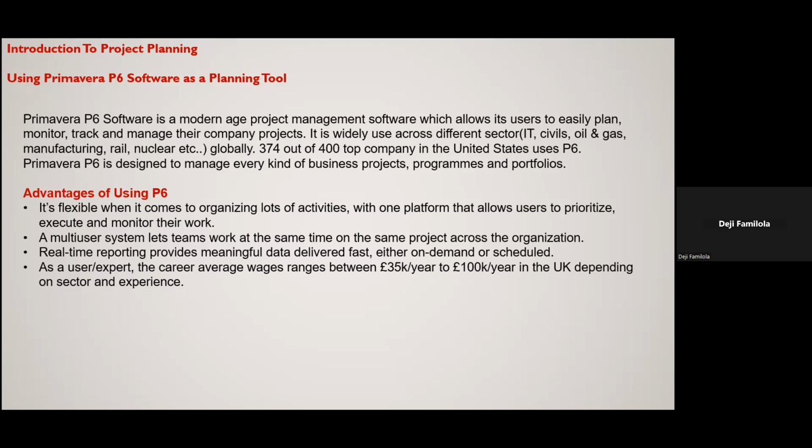Like I told you, baseline is just taking a picture of your agreement. But when it comes to comparing those pictures, you can only compare 4 at a time. So, but when it comes to MSP, you can only take 11 pictures and you can only compare 2 at a time.